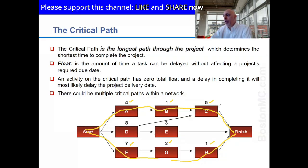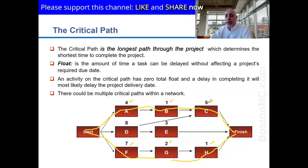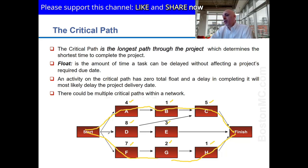Who finishes first — those working on A-B-C or those working on F-G-H? Neither. They finish at the same time, because both paths require ten days. The activities in the middle, D and E, are eight plus three — they need eleven days. So those working on D and E will finish one day after the others.